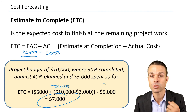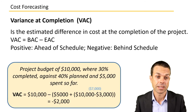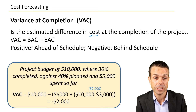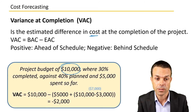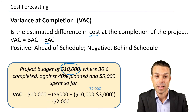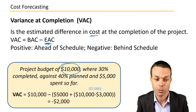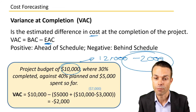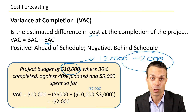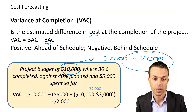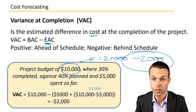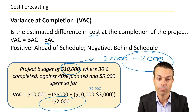The Variance at Completion is the estimated difference in cost at the completion of our project. It equals the Budget at Completion — our ten thousand dollar budget — minus the Estimate at Completion of twelve thousand. So ten thousand minus twelve thousand equals negative two thousand. A negative variance means we're behind in cost; if it were positive, we'd be ahead — we would have delivered more value than planned.